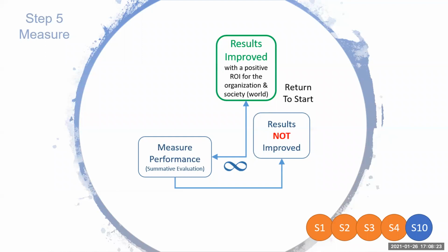So we did a whole bunch of interventions. We started applying project management. We strengthened the ISD approach that was being used to do it. We changed how the developers were doing their work internally. And we changed how we worked with the subject matter experts. And after we did all that, we were bringing the same size of projects down to 6 months in time.